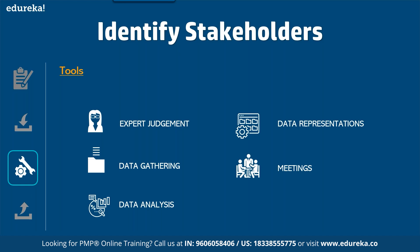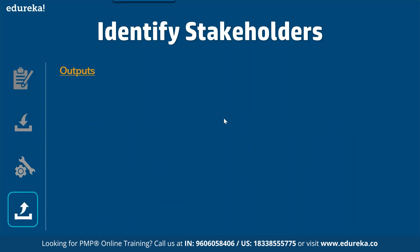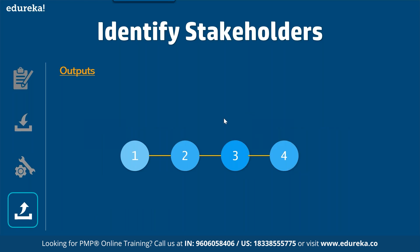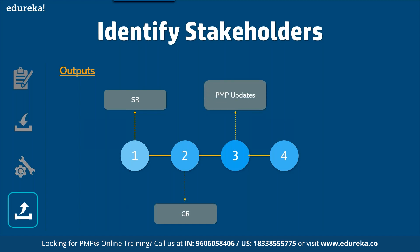Coming to the outputs for identify stakeholders, we have four outputs. First is the stakeholder register. Second is the change request. Third is the project management plan updates. The last one is project document updates. These are the four major outputs that this process produces.